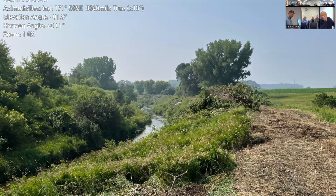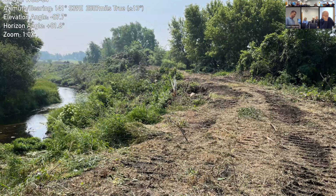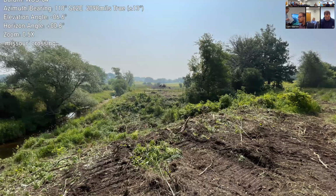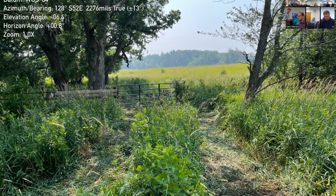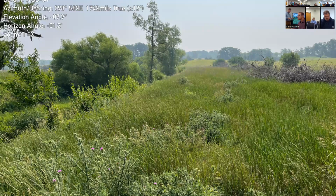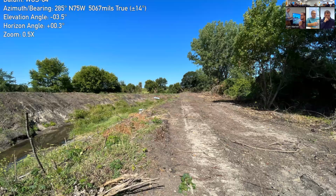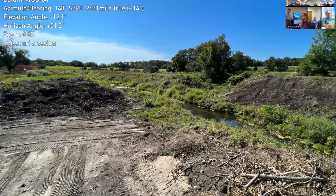For crop damages, we recommend any work inside the right of way is not compensated. The district owns that right of way, so it doesn't compensate for any damages within the right of way. Most of the work was contained within the right of way. The only work that wasn't was on Joanne Stevenson Trust. They had to access point 2 to get to the land. We did knock down about a 1/4 acre of corn.